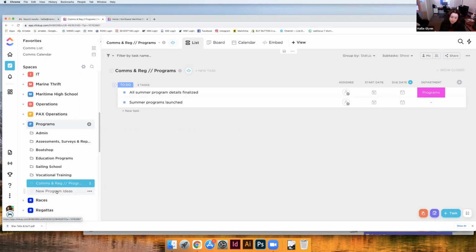Then the goal by the end of the meeting is to have all of the deliverables and work back tasks in ClickUp scheduled and assigned. And then at least one person in the meeting has ClickUp open and is adding in the tasks as they are discussed. I also want to pause and say that I'm going to write all this down, and this will be included in some documentation in ClickUp, so don't feel like you have to have all of this memorized.